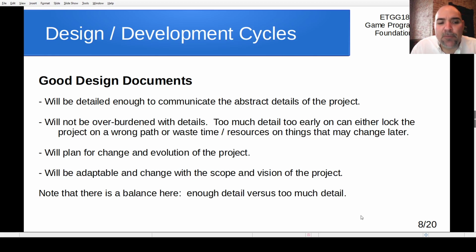So we want to have the plan itself be kind of a living document, not something that's prescriptive, not something like this is exactly what we're certain we're going to do. Everybody on the team needs to be comfortable with the idea that if they realize that part of the plan is bad or wrong or incomplete, we're going to modify that plan. It needs to be thought of as a living document more than a rule book that has to be followed. Now, you can't just go off and change things, though, either. If you're on a team, you need to talk with the team about how the plan needs to be changed.